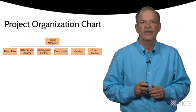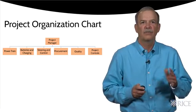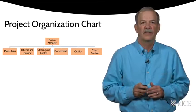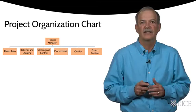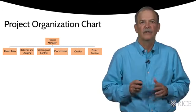Notice that both charts have the key support functions: procurement, quality, and project controls. Many charts will also contain a safety or health, safety, and environmental position if they're sufficient size.